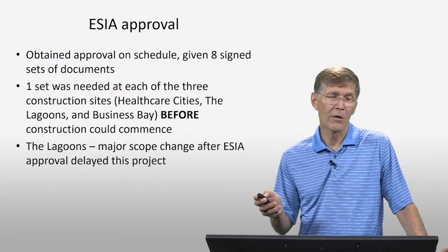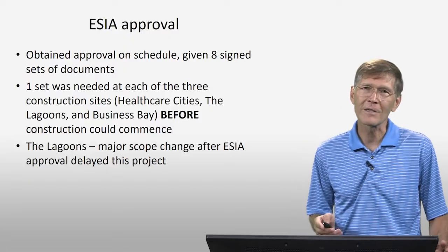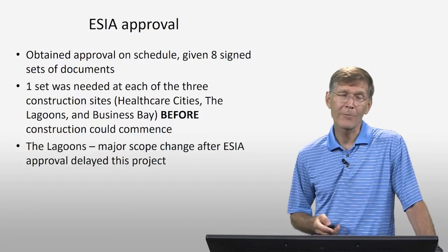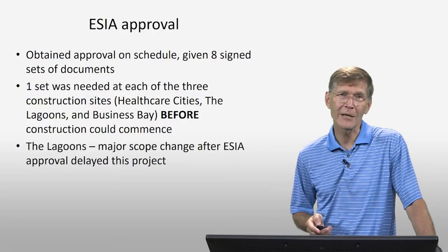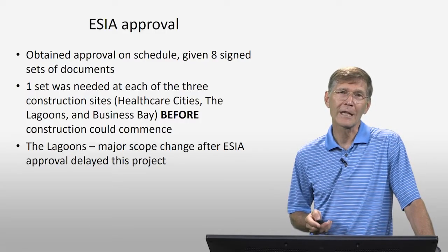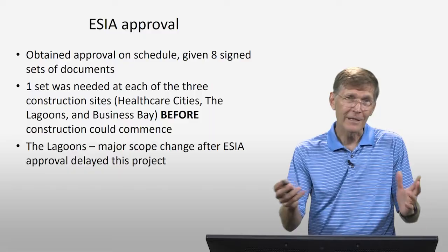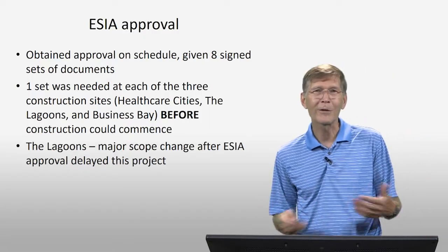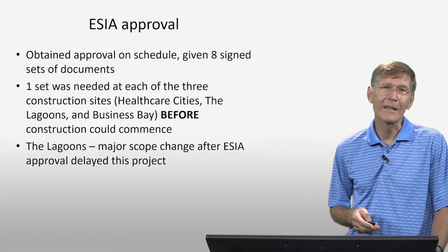And of course they said, no, no, no, and then the contract it says you have to give us the documents, then we give you the final 10%, you know. And I said, well, there's not been a good track record on the project of us getting paid, and so in order to get the documents, you need to give us the 10% first. Well, we went round and round for about 24 hours, and they did pay us.